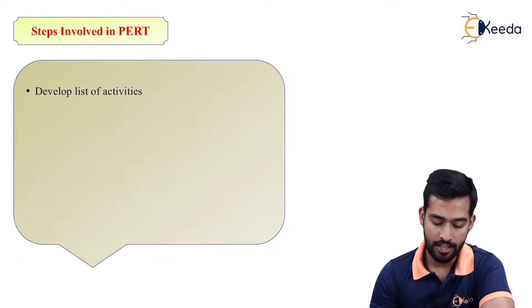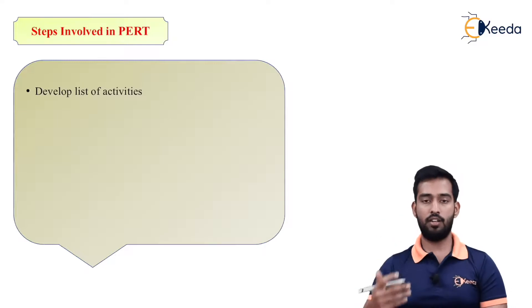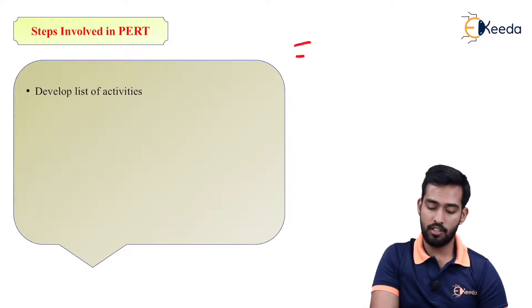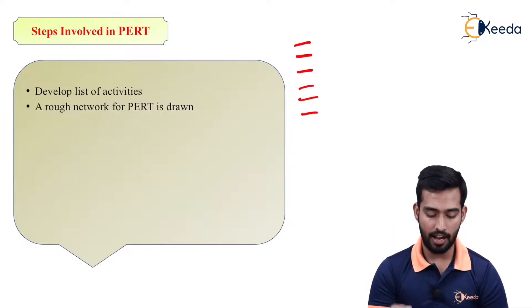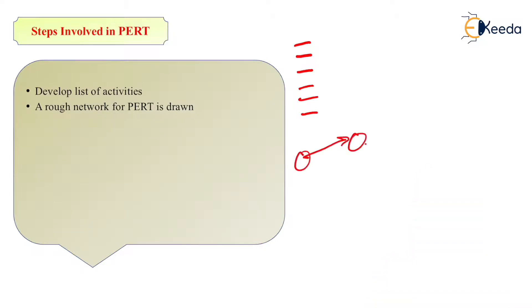Then what are the steps involved in PERT? Now first is develop list of activities. We have to find out the list of activities, divide the project in n number of activities. After finding out the activities involved, a rough network of PERT is done. So then we have to draw the network depending upon the activities we have found out and linking them together. After finding out networks, events are numbered from left to right. As we have seen the rules of numbering.